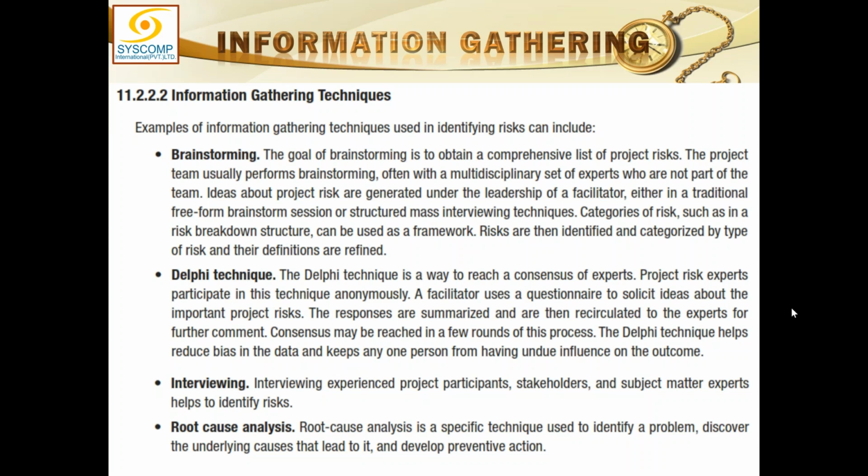But this is a very lengthy technique. It takes a lot of time. People have come up with ideas where the Delphi technique can be done at a much faster pace. For strategy-forming meetings and various other kinds of data gathering, it is now being used in a face-to-face meeting, in which they give you post-it notes. You understand post-it notes. They are given to you, and you are asked to give your points, one point per post-it note. You write your idea in a small phrase on one piece of paper, and a second idea on another piece of paper.